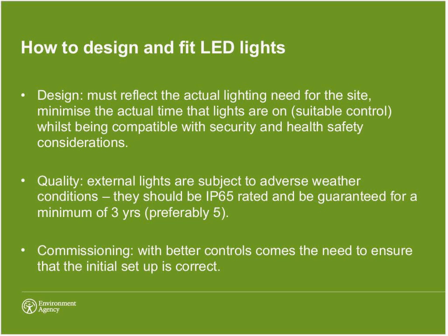Now, this can be difficult when we're swapping existing like-for-like systems, but we've tried to make sure that designers work against that where they can. As part of the designs that come back, we expect modelling of the external area, so we've got an idea of the photometric data showing the expected illuminance levels, which should be fairly uniform across the area we want lit.